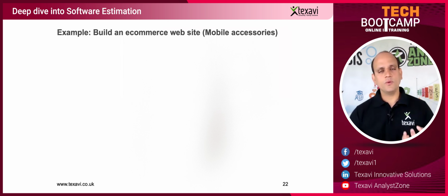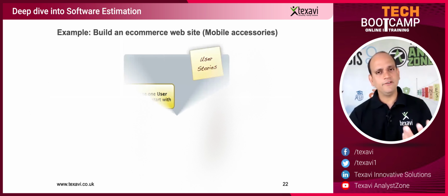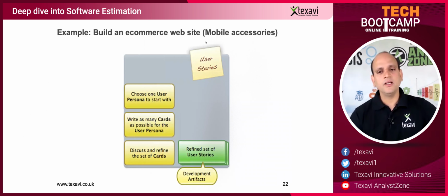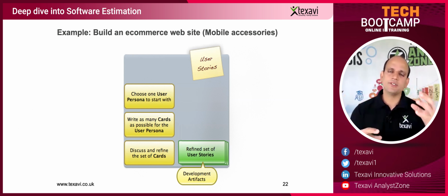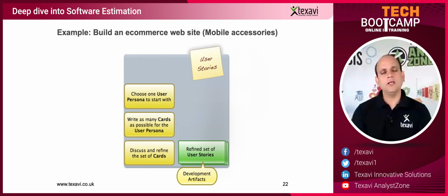What is the kind of approach that we need to take? Obviously, the first and foremost thing is basically the sizing. We need to understand the size of this. You then have a look at each of the functionalities. That's where the backlog comes in. We actually build a backlog in terms of what is involved, what are the functions you need.